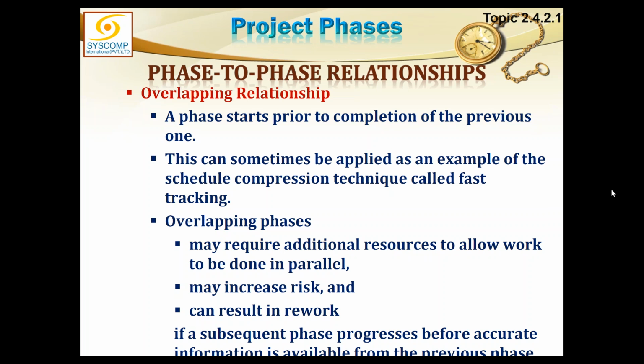Now, once they disapprove the work on phase 1, the first floor is ordered to be demolished. What will happen to the good work you have done on the second phase? That will automatically get demolished. So it is a waste. So you have taken the risk that it may not get approved and you have invested your money on the second phase just based on some promises, then probably you are putting yourself at risk.